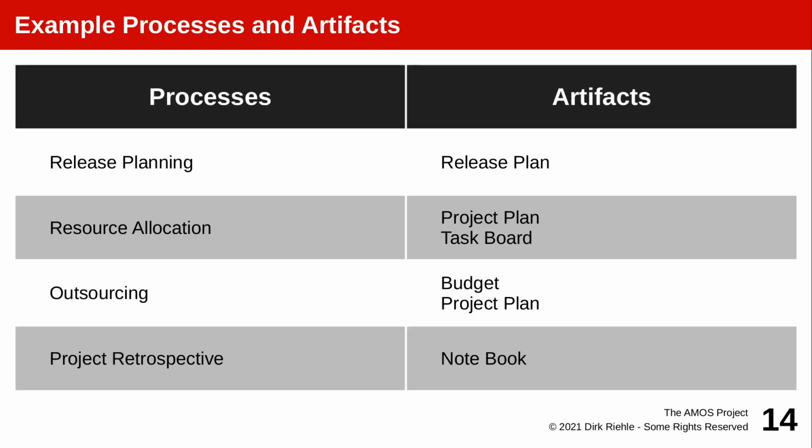You deal with release planning together with the product manager. Typically, you can tell the product manager that you think this requirement or that requirement will take so many person hours or days or weeks. So you can help the product manager who prioritizes. You can tell them how much can possibly get done. As an engineering manager, you need to understand technical interactions, because sometimes even if you would have a person, if they can't build on what they need to do the job, then they can't do that job. So feature dependencies need to be resolved, and the product manager may not necessarily see the technical dependencies.